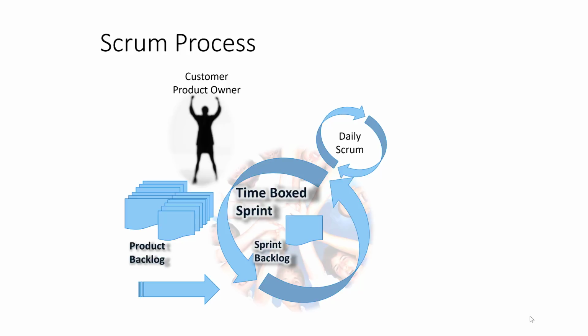So they grab those stories and they work on them. They decompose them into whatever sub elements that they decide make sense for them. And then during that sprint, they just work on them until they create completed functionality that is able to be delivered to the customer. A product increment, an increment of value to the customer. This is not a layer upon layer approach, or when we get 12 of these things, then it's worthwhile. In the perfect world of Scrum, every sprint produces value to the customer. And so the customer is able to actually use whatever it is that comes out of the team.